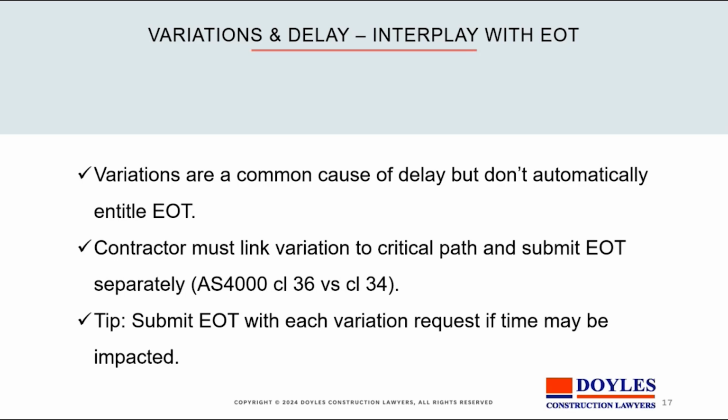Say, for example, a commercial building, and there's a variation which says, don't do the kitchen. We've got the kitchen from somewhere else. We don't need you to do the kitchen. The problem for the contractor is, well, exactly how much of the kitchen is not to be supplied. So there's delay and confusion while they define the interactions with services, interactions with air conditioning, and interactions with the ceiling that's to go in there.